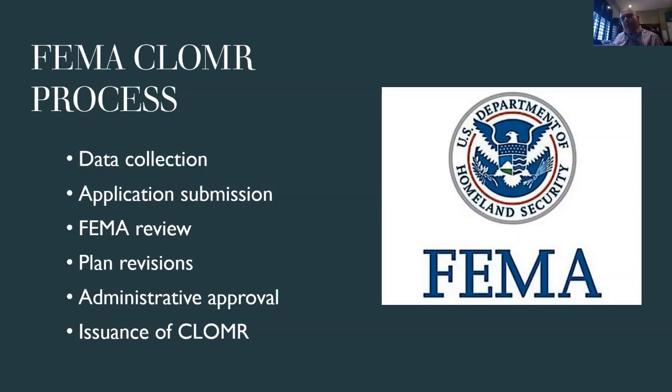They pick up these projects and they start the review. Sometimes this review, and Mark and I have done this day in, day out, takes FEMA quite some time, sometimes 2, 3 years, even in my experience, I've seen up to 10 years. And this is all back and forth, requiring a whole bunch of information, a whole bunch of alternatives. And you have to constantly respond to this technical analysis.